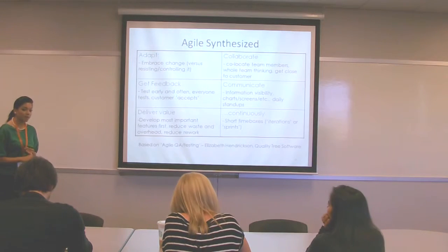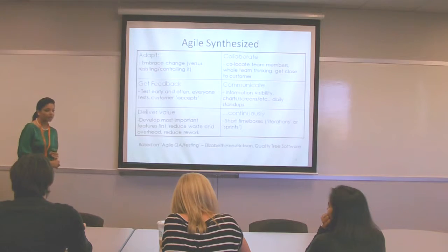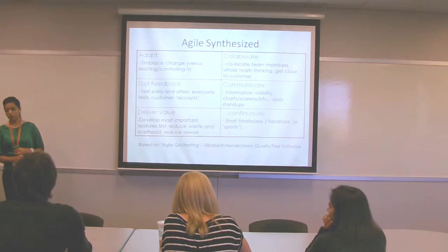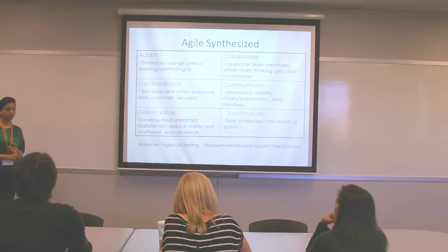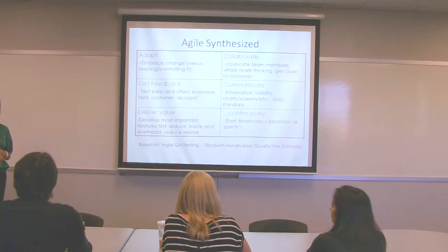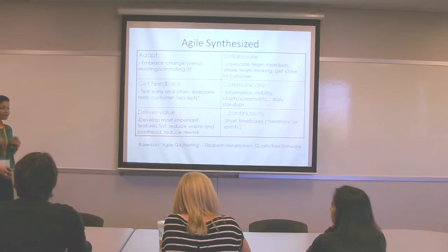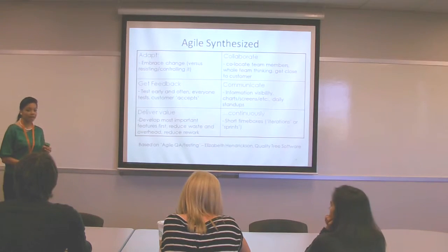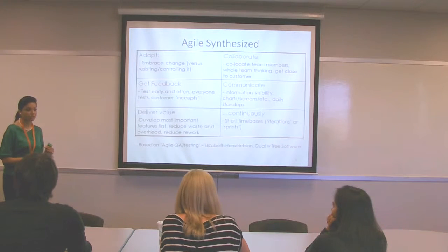And because we are meeting the customer and demoing to the customer every 2 weeks or every 4 weeks at the end of every iteration, the customer is very well aware how much time it will take for this change and what kind of change I'm asking for, and when. Also, putting it in the sprint backlog and managing it that way already takes care of the documentation that comes with the change management.